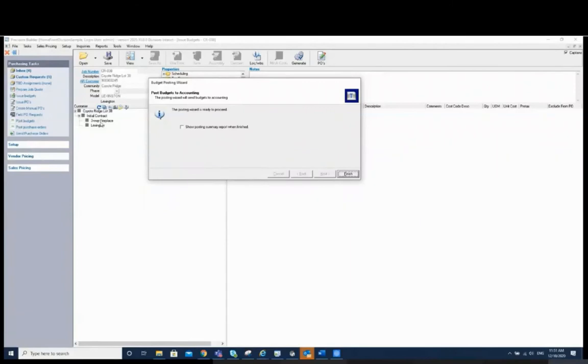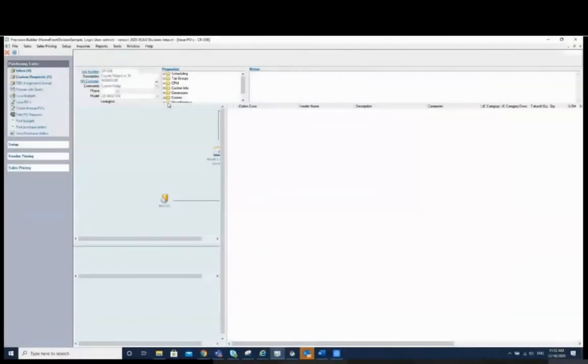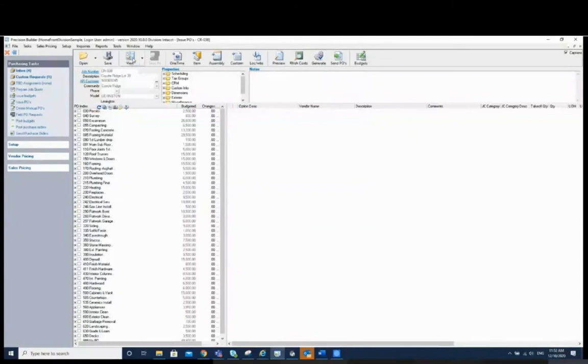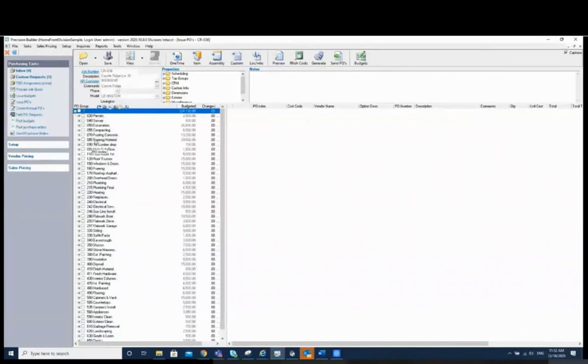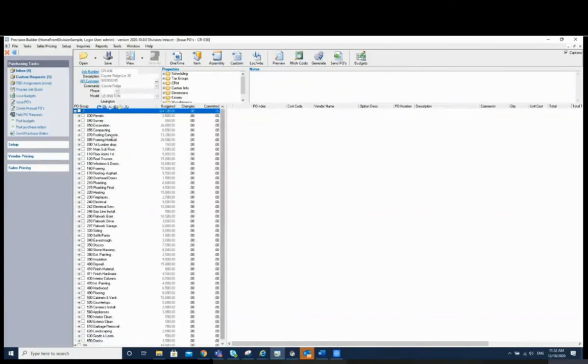And everything that we've gathered from the budget standpoint is also useful from the standpoint of being able to prepare those purchase orders and subcontracts as well. When we're at that point where we've created a budget, we've issued POs and so on, we're also at a point where we want to create the schedule for the job as well. So I'm going to toggle over to the purchasing view of the job. And many times, a lot of our clients will issue POs all at once. But prior to that, you see I've got a budget value and I haven't committed to anything yet.